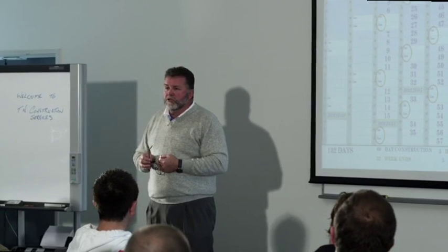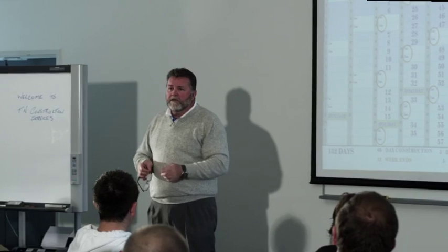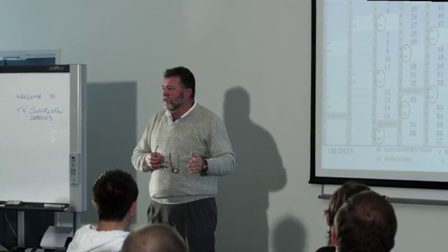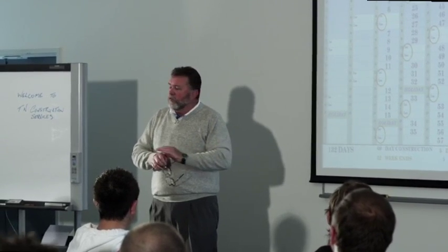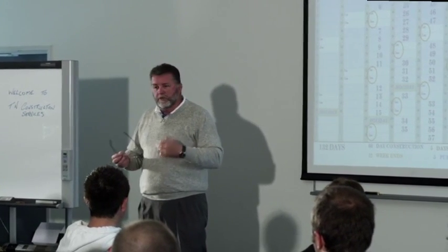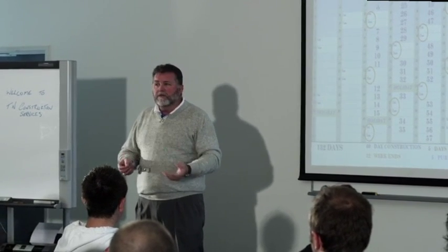When I was building commercial work, my contract simply stated that if there was one day of rain, it constituted three days of extension of time because I couldn't get back on the site. We had situations where we would be pumping footings out for 24 hours a day just to try and get concrete in the ground. And of course, what happens then?